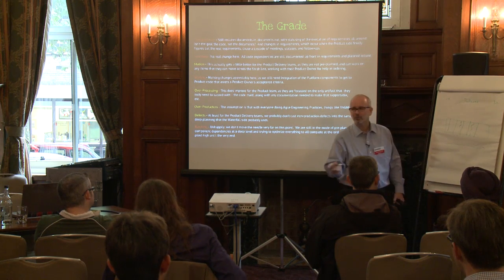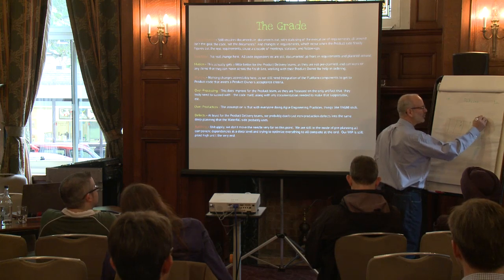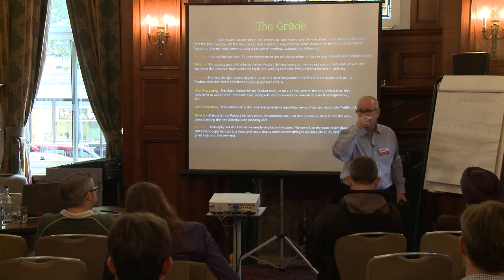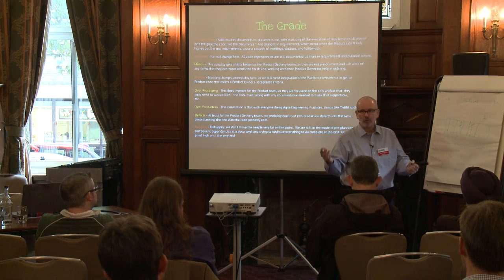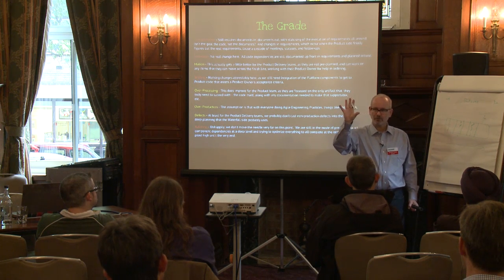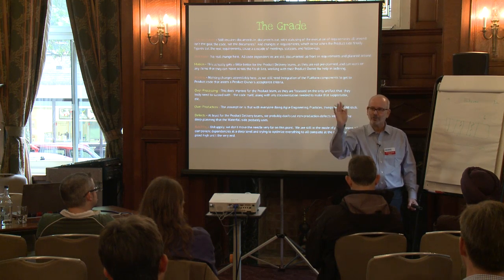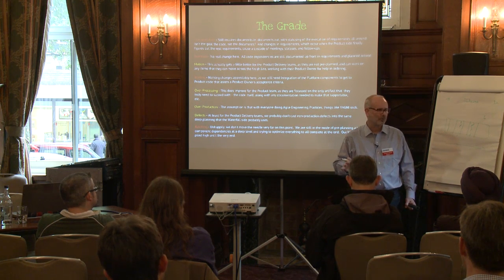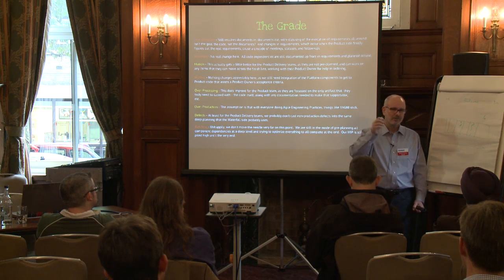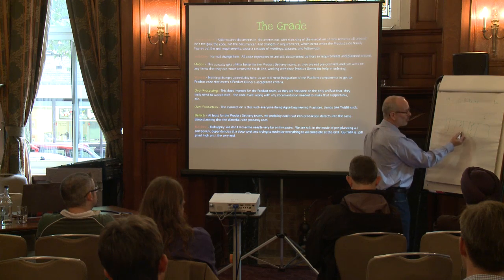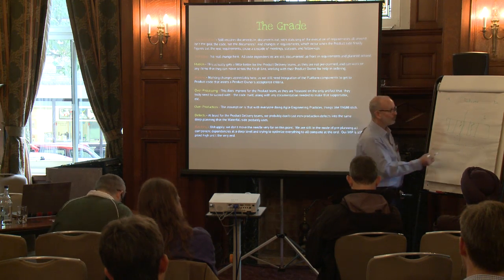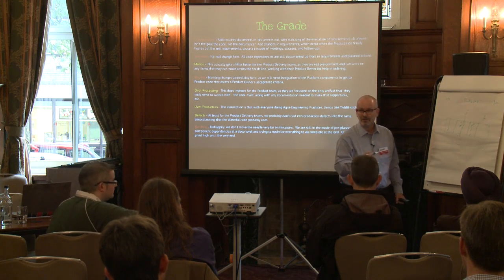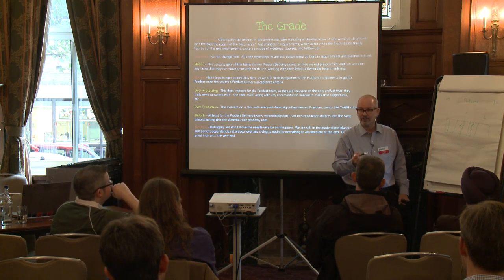It overlays our traditional sorts of 6 iterations within a release. And in a Scrum world, typically, where there's some complicated stuff, we kind of think in our minds, oh, in that last iteration we don't want to take on too many new features. It's an unspoken truth, right? But when you look at most waterfall teams, especially teams that have had trouble, they're reserving like 2, sometimes 3 iterations inside the release.